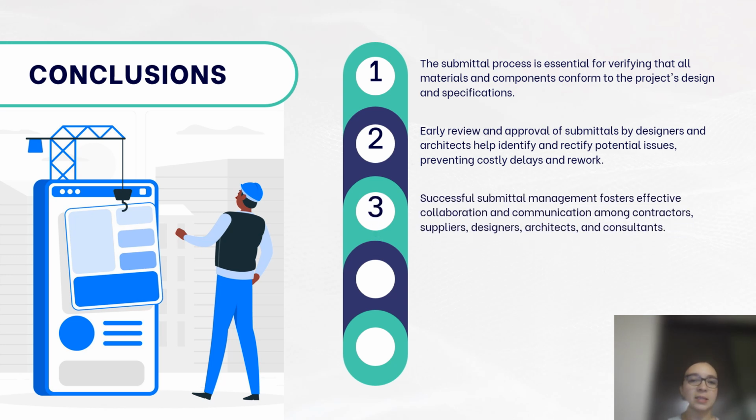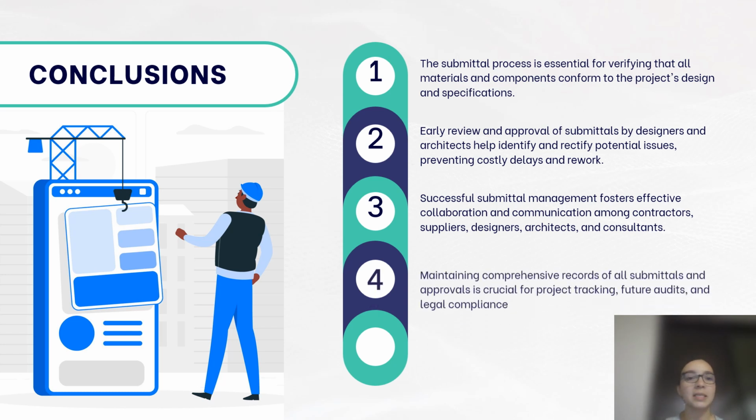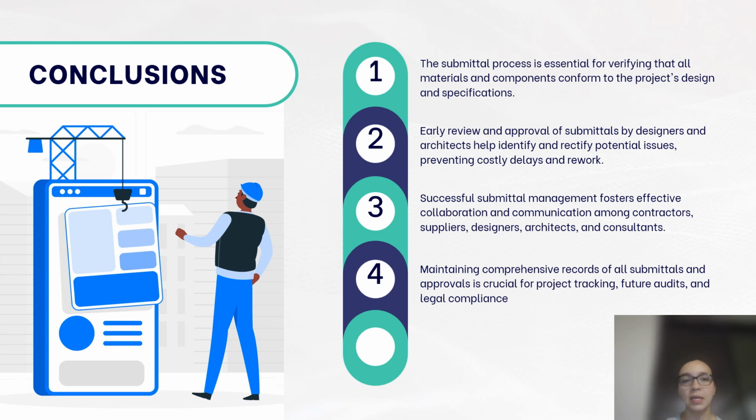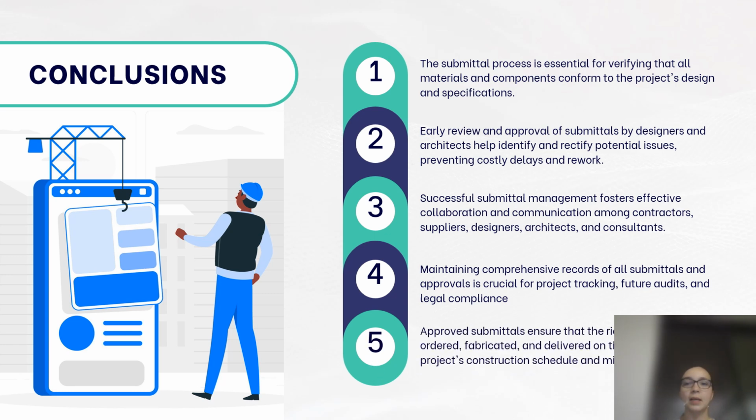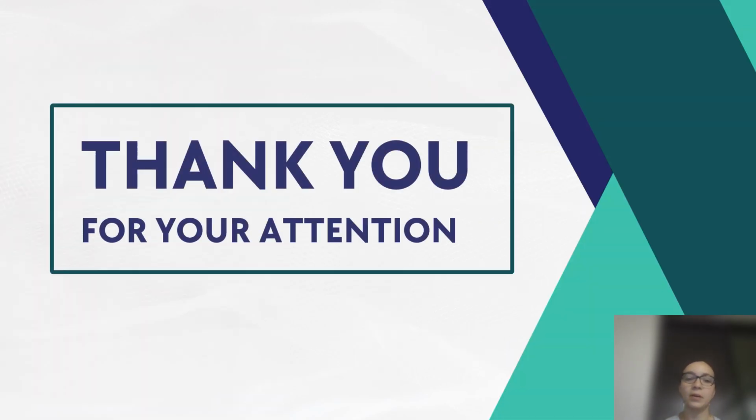Successful submittals management fosters collaboration and communication, while maintaining comprehensive records is crucial for tracking and compliance. Approved submittals ensure that the right materials are ordered, fabricated, and delivered on time, aligning with the project schedule and milestones. Thank you for your attention.